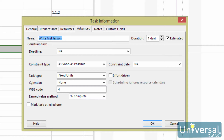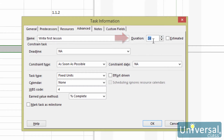The total duration will appear for the parent task. Use the arrows to increase or decrease the duration. The measurement displayed by default is days, or D. If you need to change the measurement, enter M for minutes, H for hours, W for weeks, and MO for months.